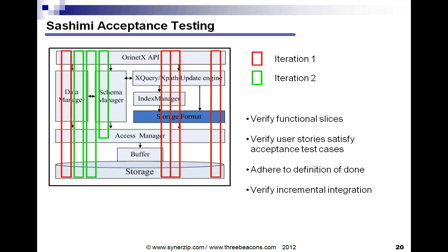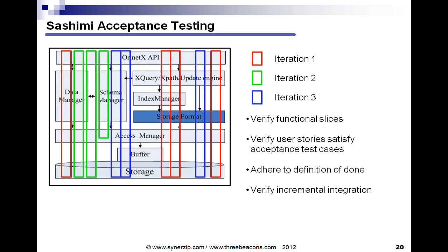Now what you'll notice in an Agile approach is that every time a new sprint's worth of user stories come in, you have to go back and regress the previous sprint work in order to ensure that nothing in the current sprint has broken a previous sprint functionality. And that's where it becomes very difficult to do that manually. So that's where you need the test case automation to, in theory, press a button and verify that the previous test cases are regressed correctly and show a green status.